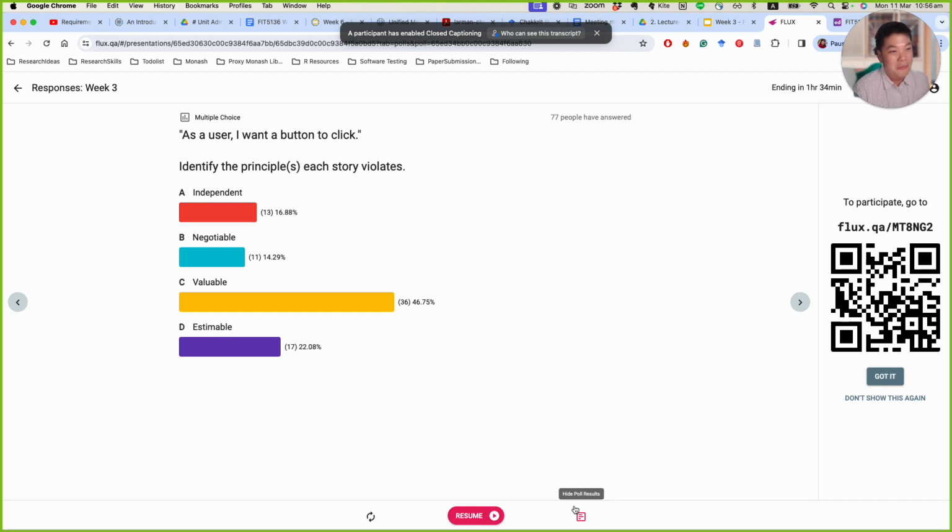Yes, it is too vague, and it's vague enough so the product owner or the development team don't know the value of this feature, of this user story. What do you want to happen when the button is clicked? That's right. So it doesn't tell the benefit. It lacks the "so that" part, or even the purpose is not clear. Why do we need this user story?